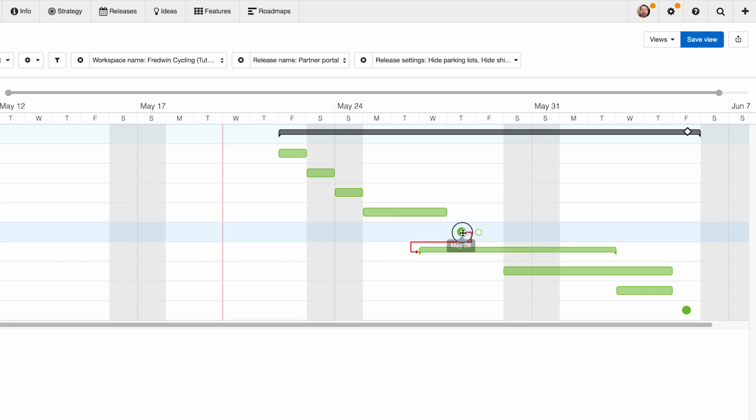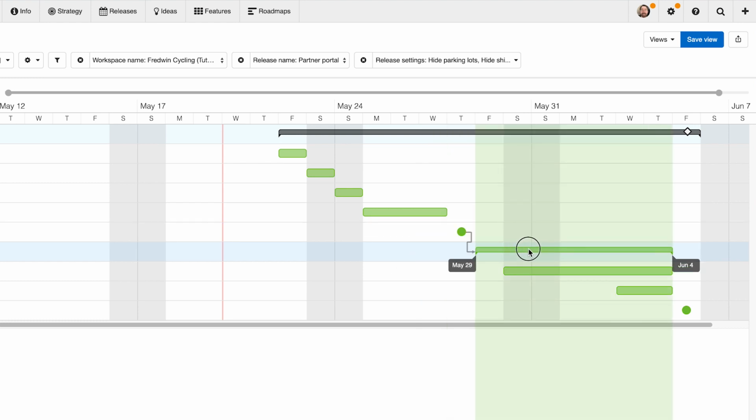And here you can see that the dependencies color changes as I push it earlier. Or if that date can't move or can't move much, I can talk to the engineering team and say, look, we've got to push out development because product is not going to be ready yet. Those are really healthy conversations to have right now before you get to the end of May and you're already in the thick of it.